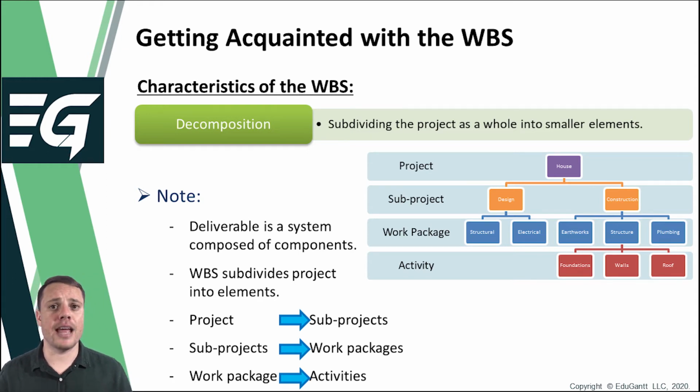The number of levels and their respective names are of course dependent on the project management methodology being used and the procedures and requirements that exist within the organization. The levels shown here are what are most commonly used in practice, and they also adhere to the recommended format of the PMBOK Guide 6th edition. The names and levels generally do not matter, as long as the principle of decomposition is applied. The ultimate purpose of the decomposition of the project is to reduce the complex project into several smaller and less complex elements which are sufficiently defined to allow for easy planning, budgeting, scheduling, and monitoring and control.